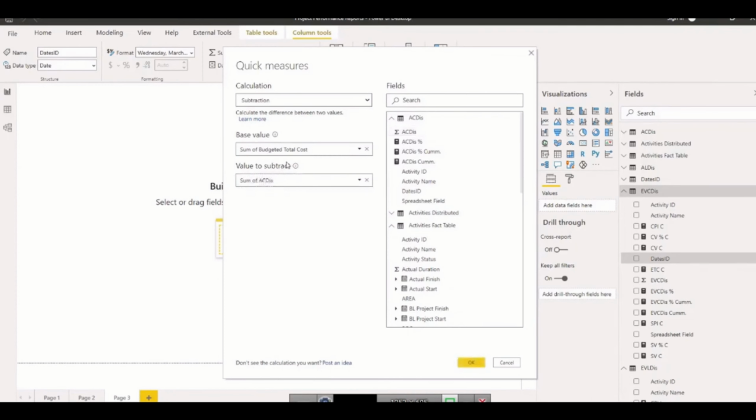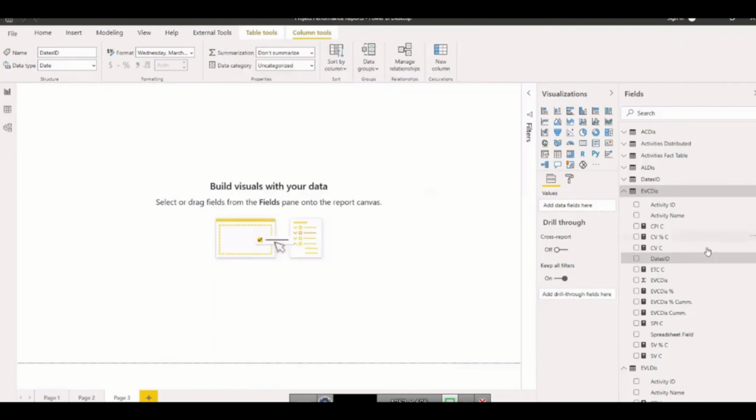If I subtract this, whatever budget remaining in my hand is the estimate to complete, regardless of the scope. Maybe this value was 100, currently let's say 75%. So remaining budget is 25% or 25 million, let's assume, but remaining scope can be 50% because earned value is only 50 so far. So that's your thing now to control how you want to do. But this is one of the cases you can create the estimate to complete.